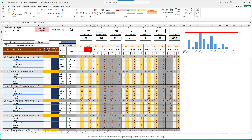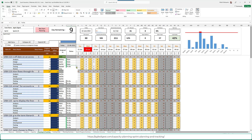Once all subtasks of a story are green, you must manually mark the story as 'Done.' The moment it is marked done, open task counts update accordingly. When all tasks are complete, the story automatically turns to done status. The percentage done updates — for example, one percent of stories completed — and you can see the ratio of capacity used versus effort remaining and completion percentage.